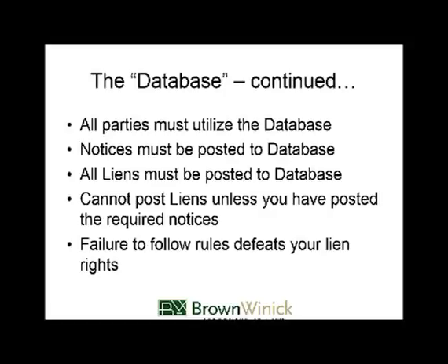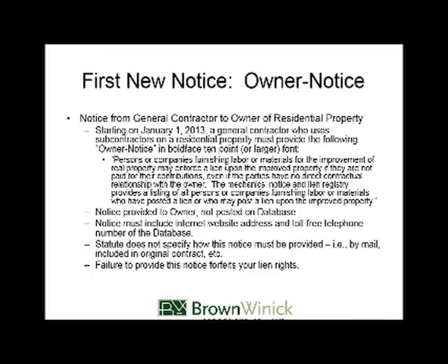But the way the new rules are written, if you do not post a notice, it specifically says you will lose your lien rights. And as we'll see as we go through it, there are certain time periods as to when items need to be posted. And if you miss them, you are out.